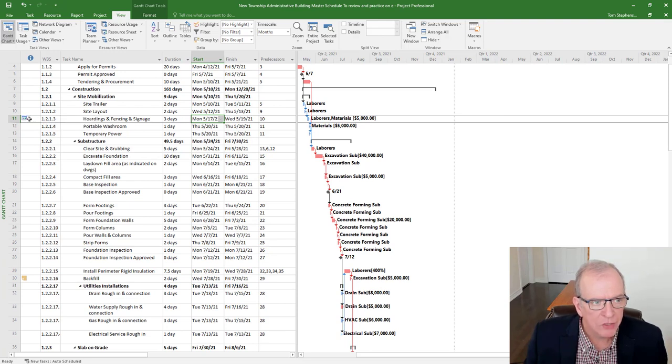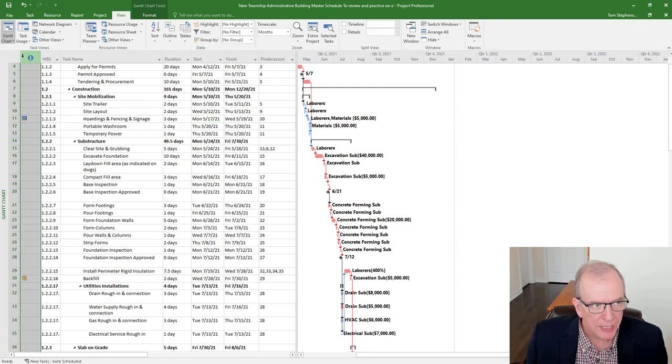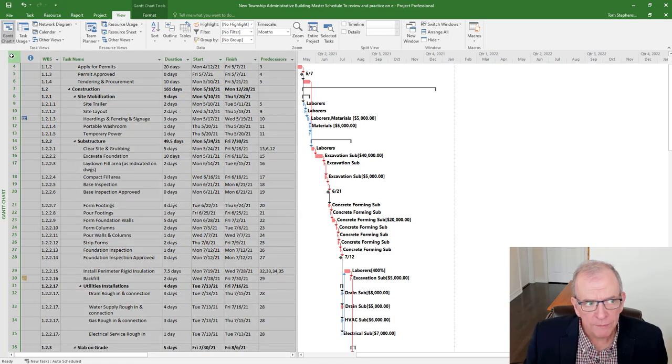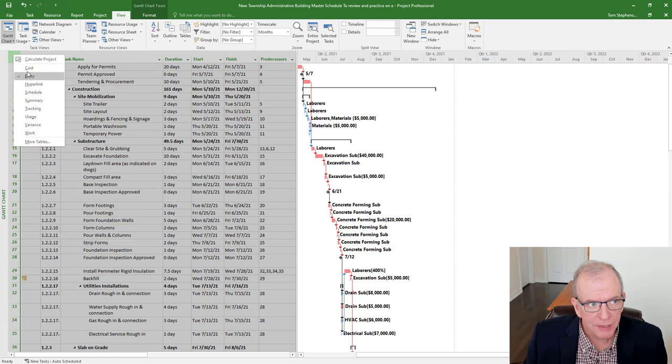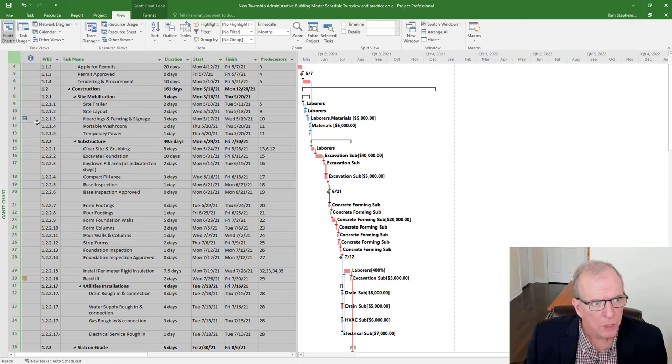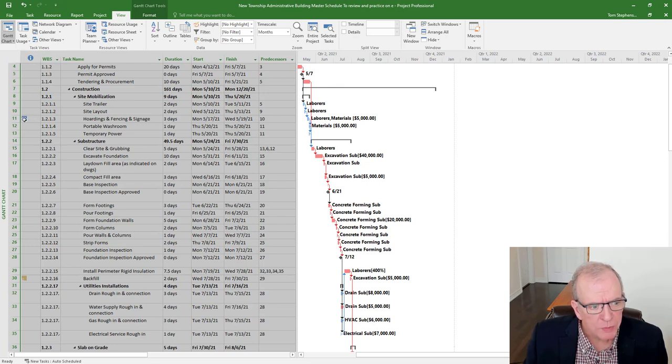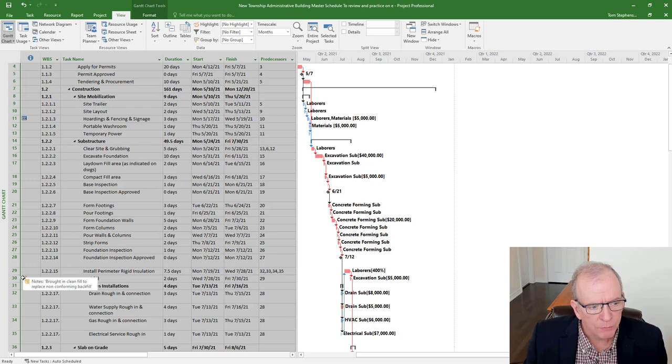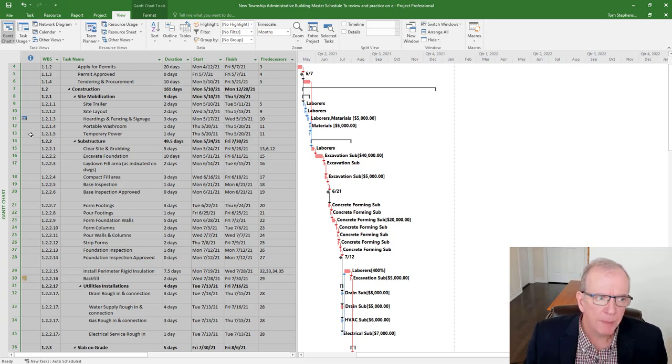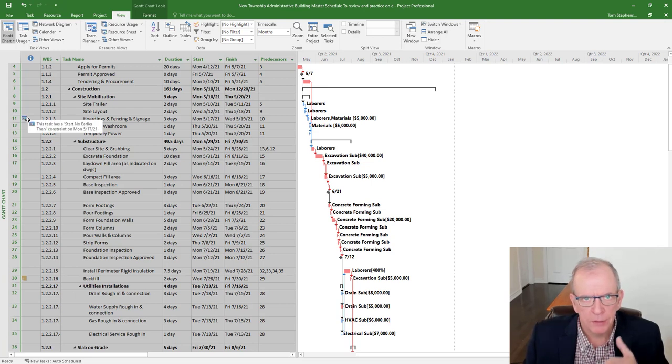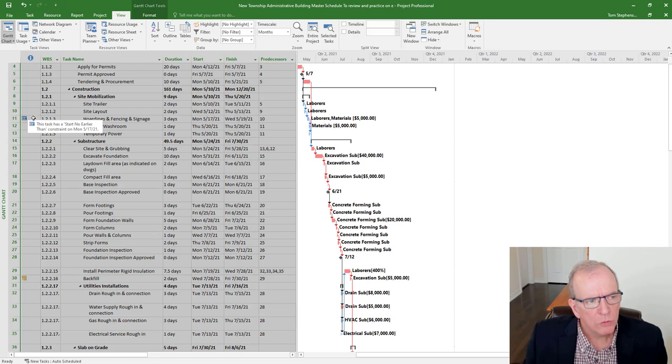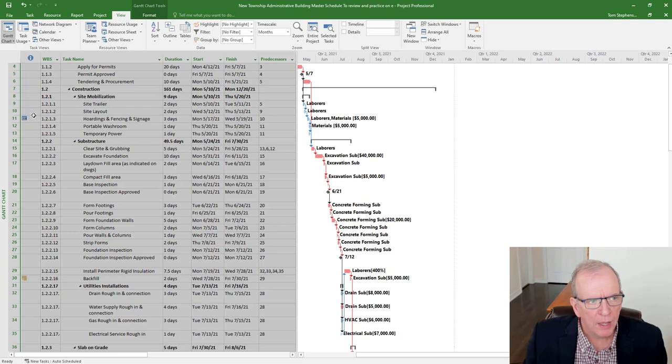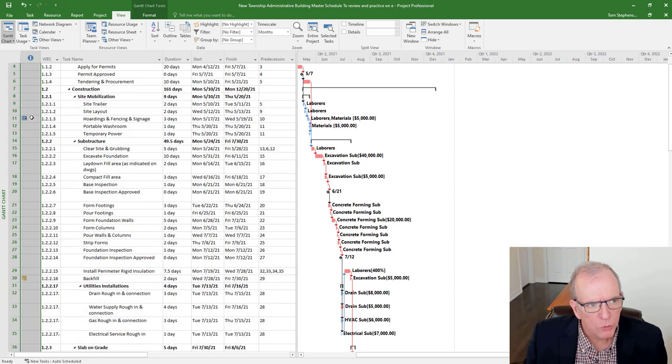I can go to view and I can go to outline and I can say, show me all the subtasks. And then it opens everything up. So I can see that this has put a constraint over here. This task has a start, no earlier than. So this indicator column with the eye, which you'll find in your starting view, which is the entry view. So that indicator column always shows me if I did something special to an activity, like I put a note on it.